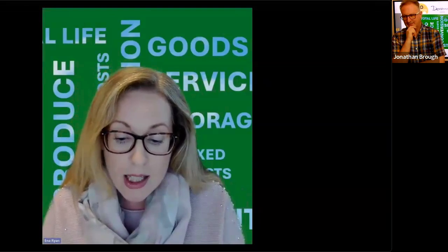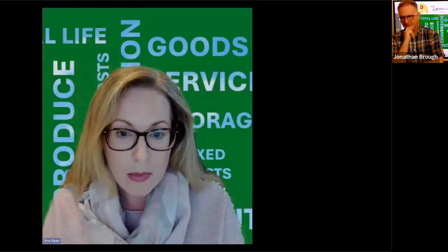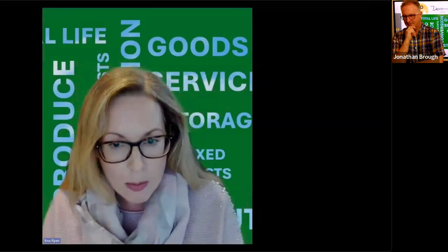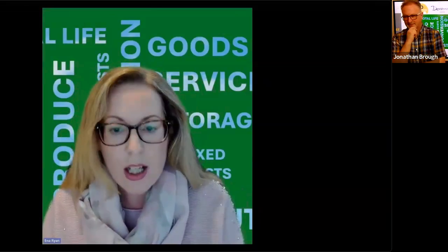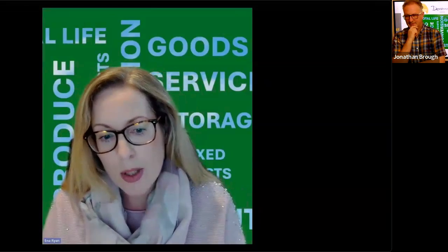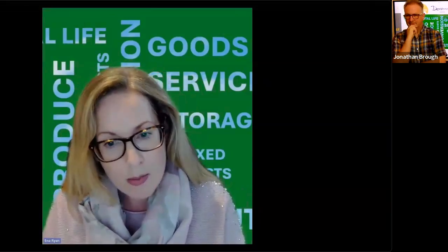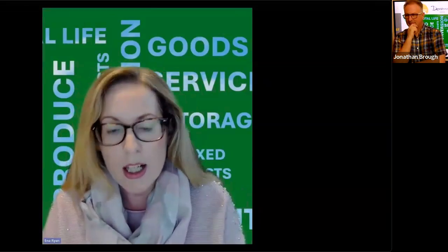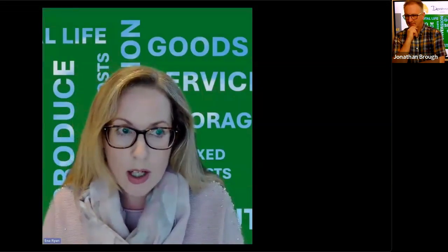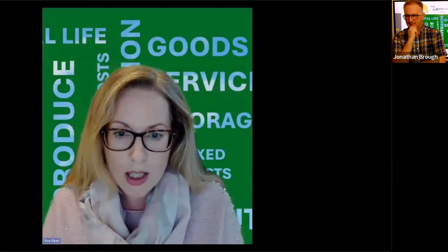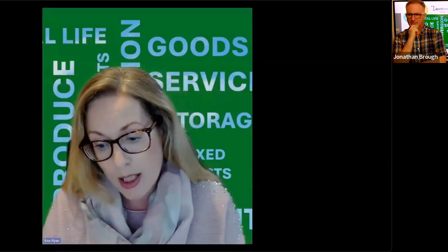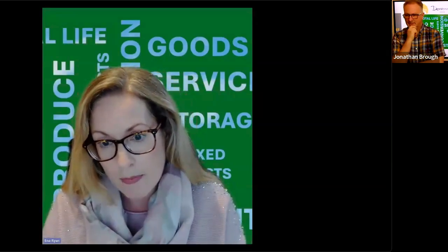stable. And the last selection criteria that's obviously become much more important in recent years is sustainability. 10 years ago, this probably was not even considered. And then it was only, will the supplier agree to our code of conduct? But now we have much more sophisticated systems for measuring supplier sustainability, and we ask for quite a lot of information on that. So if we're looking at a product, it would be commercial, quality, service level, capacity, lead times, financial stability, and then sustainability.